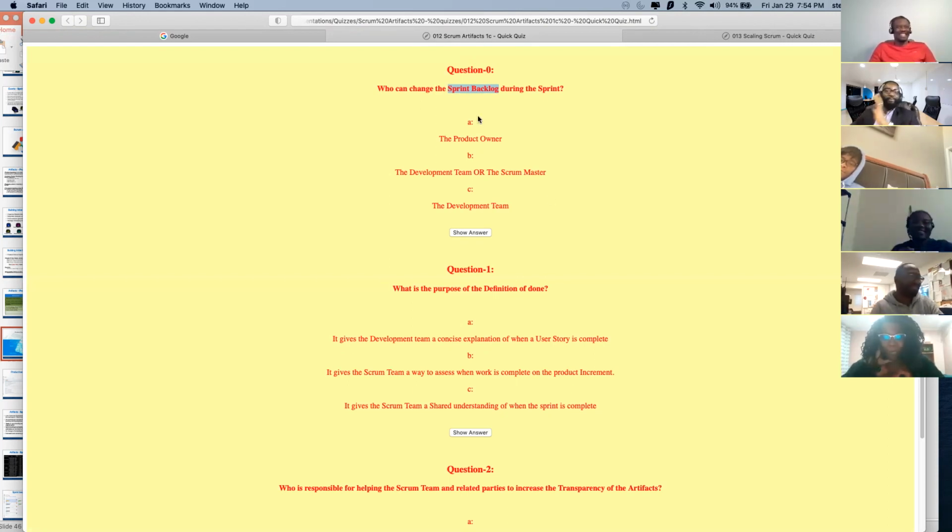All right, so that's the sprint backlog. Again, the sprint backlog is owned by the dev team, because that's all the product backlog items that they plan to work on during the sprint. Nobody can change that. We said yesterday that nobody can make any change to it if it's going to impact the delivery of the product increment or mess up the sprint goal. Nobody tells them how much work to take.